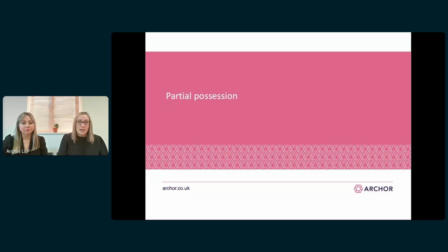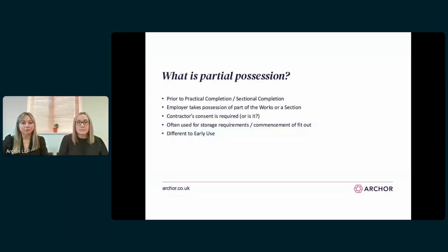Okay, so moving on then to partial possession. Partial possession is basically where prior to practical completion or sectional completion, the employer takes possession of part of the works or part of a section of the works. And the part that is taken is referred to under the JCT suite as the relevant part.